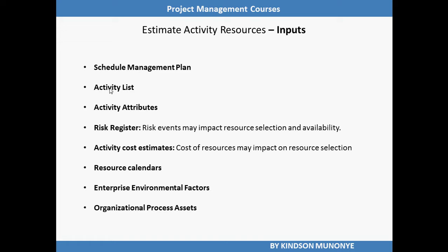Resource calendars specify when and how long identified project resources will be available during the project. This information may be at the activity or project level. This knowledge includes consideration of attributes such as resource experience and/or skill level, as well as various geographical locations from which the resources originate and when they may be available. So resource calendar is one of the key and necessary inputs for the estimate activity resources process.